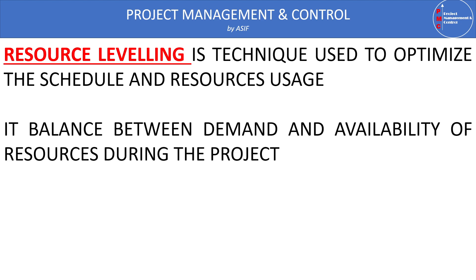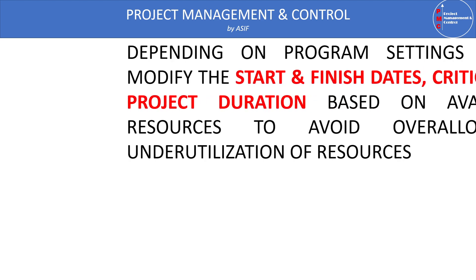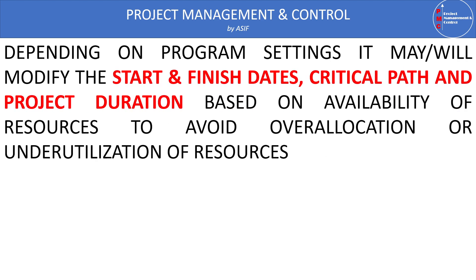On the other hand, the disadvantages are that it increases schedule complexity, and the project duration may increase because of unavailability of resources. It reduces schedule feasibility and stability, and it has potential trade-offs between resource optimization and project objectives. It also needs continuous monitoring and adjustment during the project life cycle.